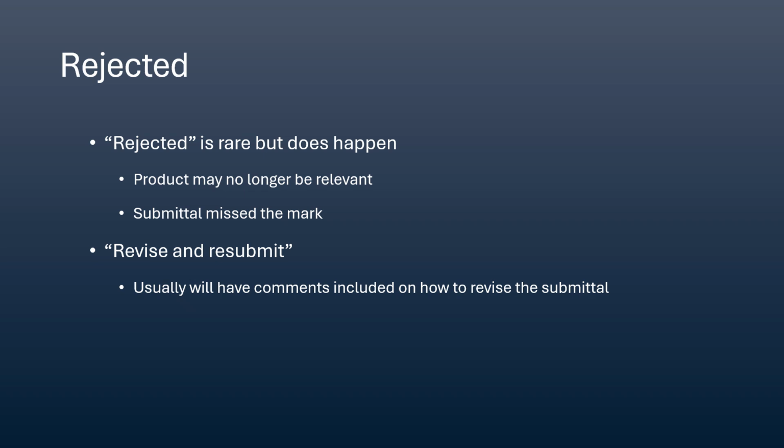Let's say, for example, that I'm building a commercial building. It has a tower on top of it. That tower has originally a steel grid, and while I'm working on that submittal, another product comes in that the architect likes even more, and let's say that it's a carbon fiber structural grid, and it's lighter, it maybe is cheaper, and the architect wants to go with that instead. That carbon fiber grid was not in the specifications, but they will revise the specifications to make sure that it's included. And so if I send in my steel grid submittal, they're going to go ahead and just reject it because that's no longer the plan.